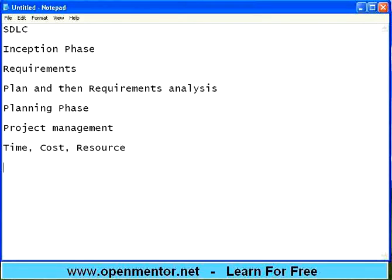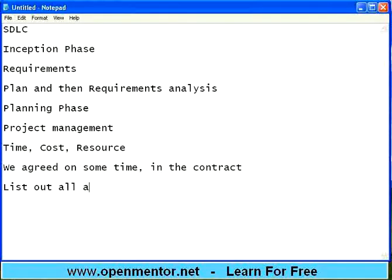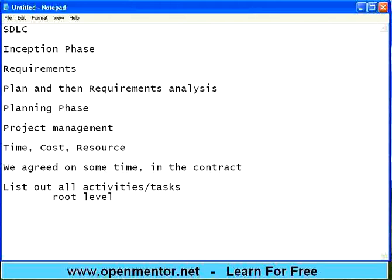With respect to time, we agreed on some time in the contract — say six months or three years — to execute this project. But how are you going to utilize this time? You need to have proper planning or a schedule that says on this date you should be completing this. List out all activities or tasks at root level, not just macro level, because if you do it at macro level you may be missing some of the finer aspects.